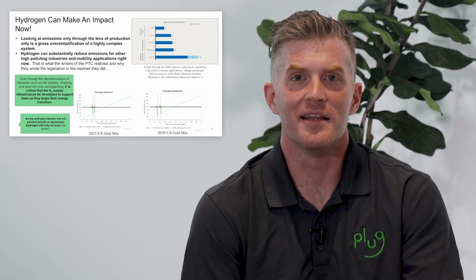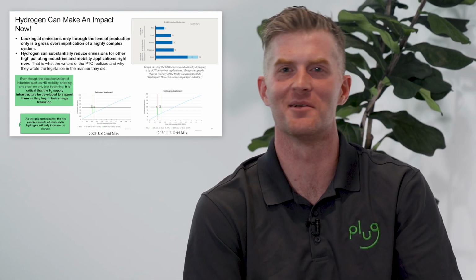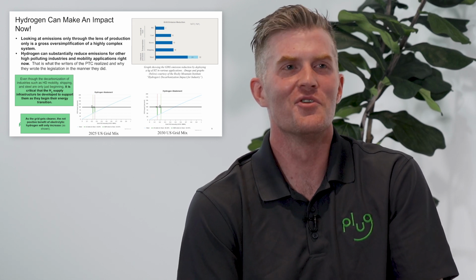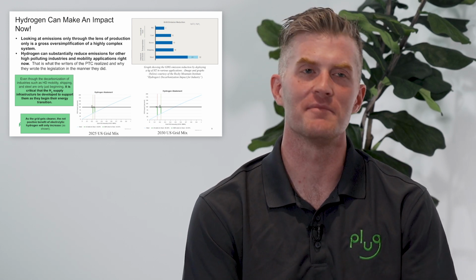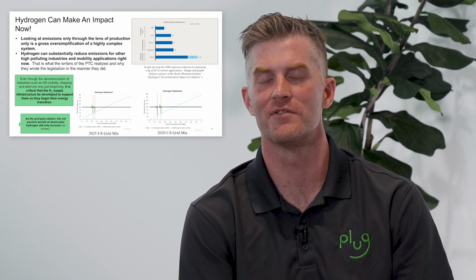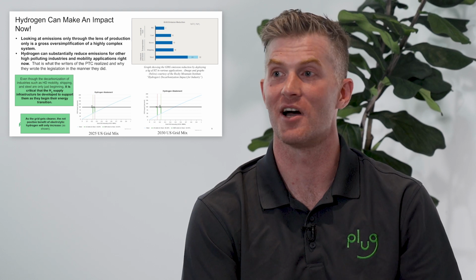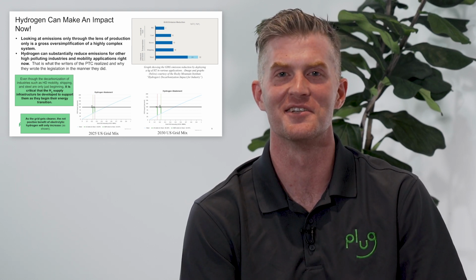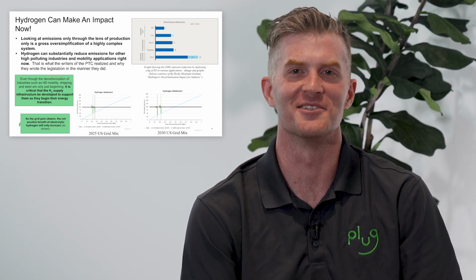But you don't wait until they're ready before you start developing your supply infrastructure. If you do that, you push everything back 10 to 15 years, right? It will take a steel plant, admittedly, at least 5 years probably to convert over to be able to fully decarbonize with hydrogen. So you don't sit there and wait for the steel plant to come to you and say, all right, now we're ready, everyone. Now start your production projects for the hydrogen. So give me another 5 years, guys, and then I'll be able to bring you that hydrogen.